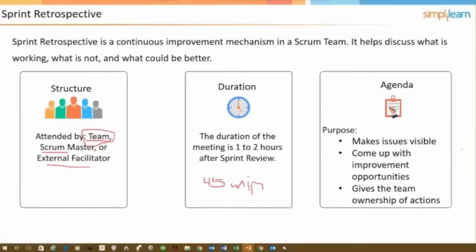And it's not just a chat session. Well, that would be part of it. You will use tools and techniques, like some that I mentioned, control charts, Ishikawa diagrams, 5 whys. There's a number of things that you might use in order to surface assignable causes for issues so that we could then come up with a resolution to those.